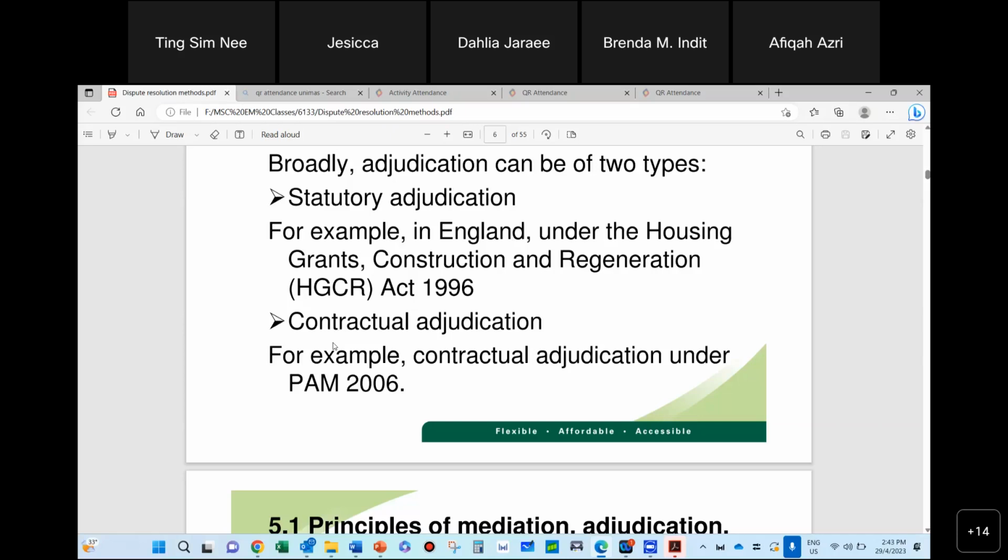Yeah, arbitration is there for if it's a very legal fine point of view, you can get a lawyer, you can get a retired judge to come and be your arbitrator, and a lawyer to argue your case in arbitration proceedings. But for adjudication, if it's a very legal fine point kind of thing, you would not get an engineer to look into it, because the engineer will be looking into technical.